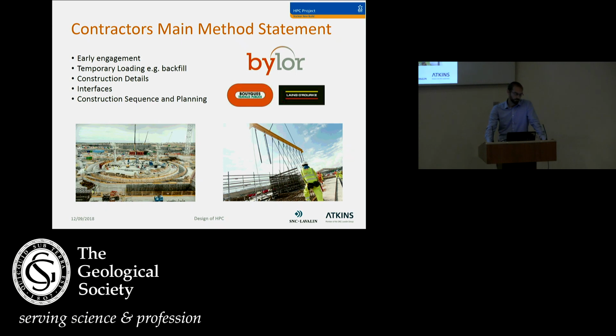One of the really positive things that I found on this project was the early involvement with the contractor, in this case Bailo, which is a joint venture between the French contractors Bourget and Lang O'Rourke. And getting them involved early, and we actually had a member of their team sitting in the design house. It really did benefit the project, and I know often it's preached about early contractor involvement and engagement, but it really did make things